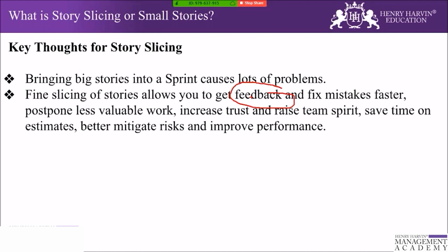You can also make a guideline in the sprint that no story of 13 points should be taken into the sprint. If it is a 13 pointer story, it has to be split into either 8 or 5 pointer stories. But the question then comes: okay, fine, we said a 13 pointer story can be broken down into a 5 pointer and an 8 pointer.